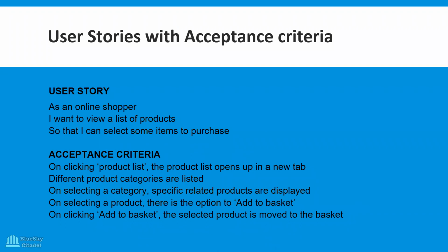This second example I put on to show us that it is not only the given-when-then format that you can use when you have acceptance criteria written up. You can have, like I said, a set of statements, a list of yes or no questions or actions that have to happen.